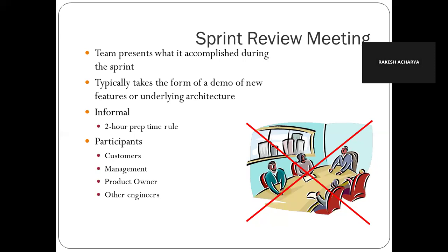At the end of the sprint, once your sprint is over, you people have developed the application, those particular modules. You will give the demo to your stakeholders and product owner, so they will know what you have developed in these 2 weeks, and if they provide any comment or add anything, then you have to rework. If there are no comments and it looks okay, it means that particular code is now final and ready and you can commit your changes. No future changes are required on that code.